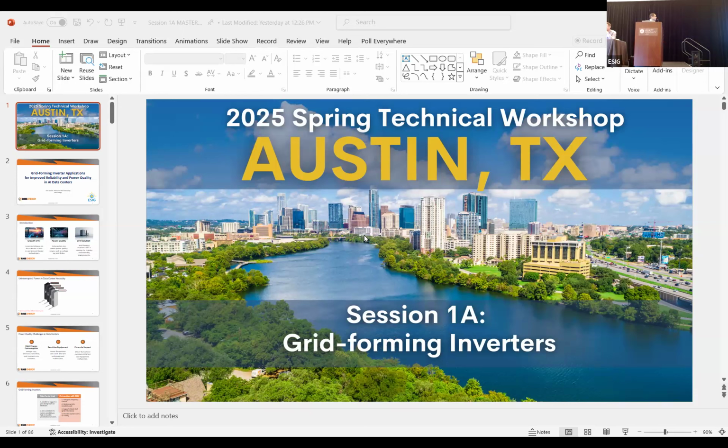So the landscape is changing basically. Now we are having reduced supply, increased demand, and we have plans. And as everybody knows, the timelines to construct new gas are expanding. So we are focusing more on renewables. We are doing 3 procurement efforts. The expedited LT was done, we did all the studies for that, and we started commissioning some of the plants, 1.2 gigawatts. Overall, we are expecting to add close to 6.6 gigawatts. This number has been revised, by 2031. So 6.6 is not a big number, but if you look at the percentage of our peak demand, that's significant. That's more than 20% of our installed capacity, and that's coming over the next 6 years. So that's the challenge we are having.